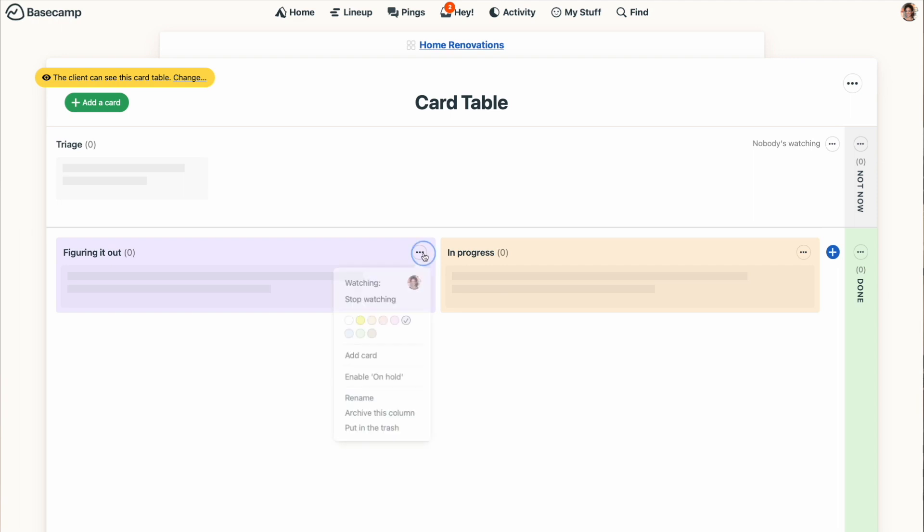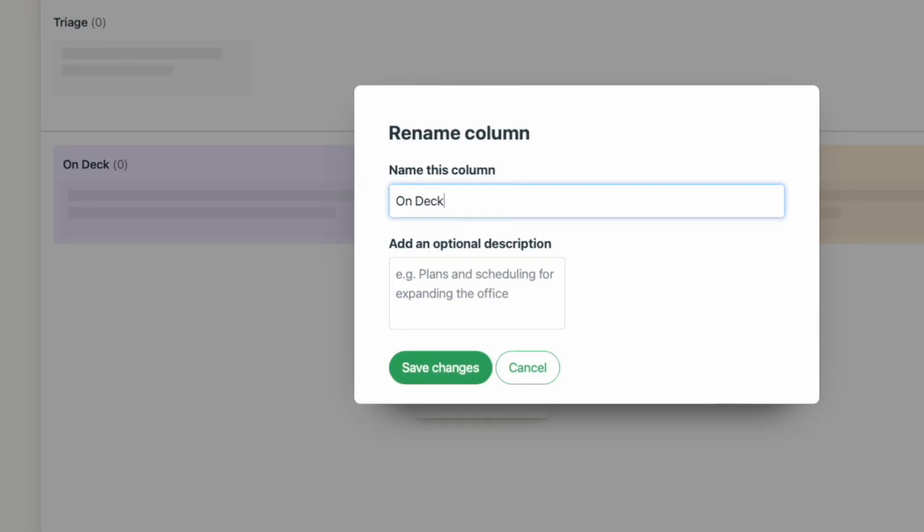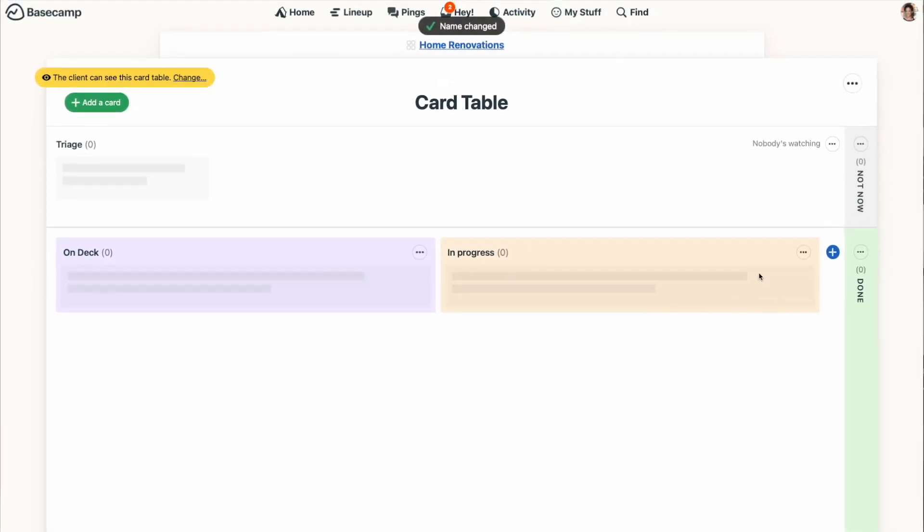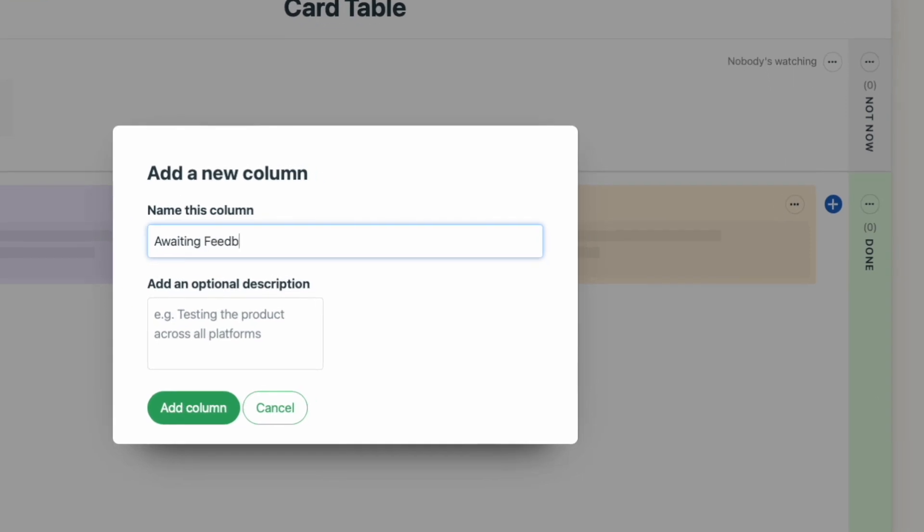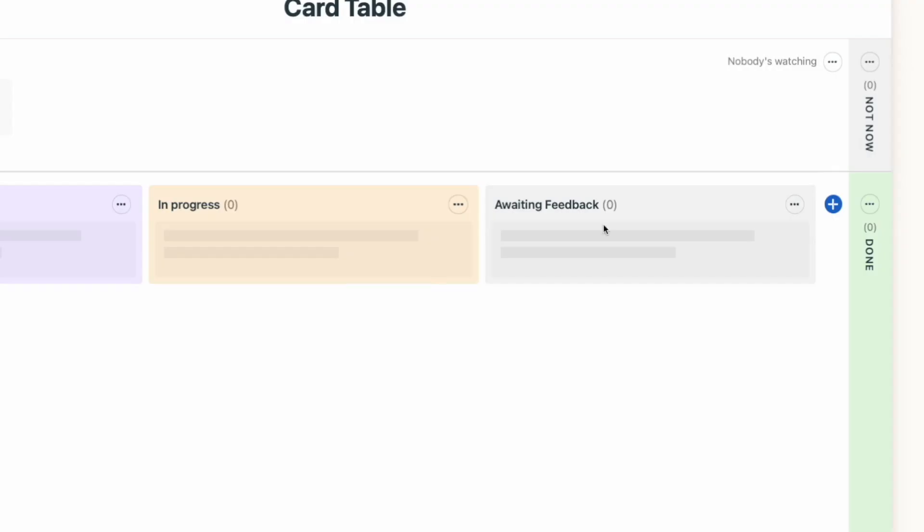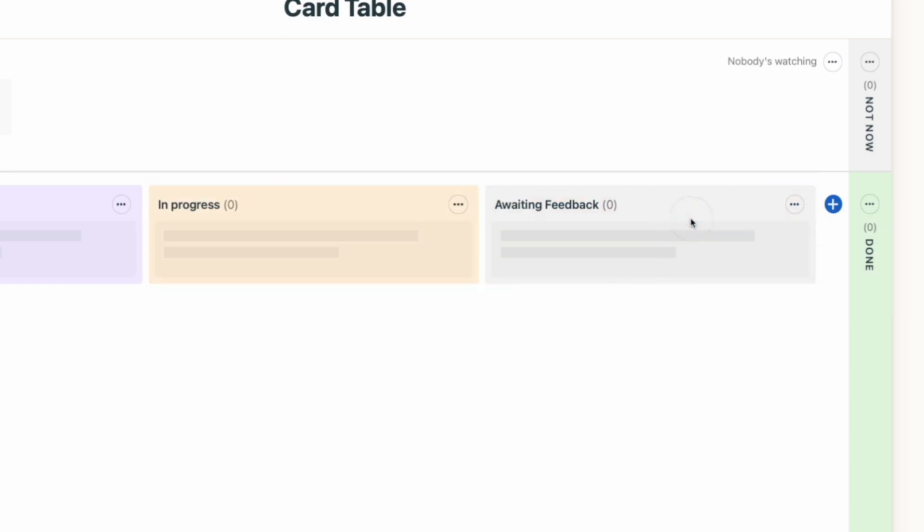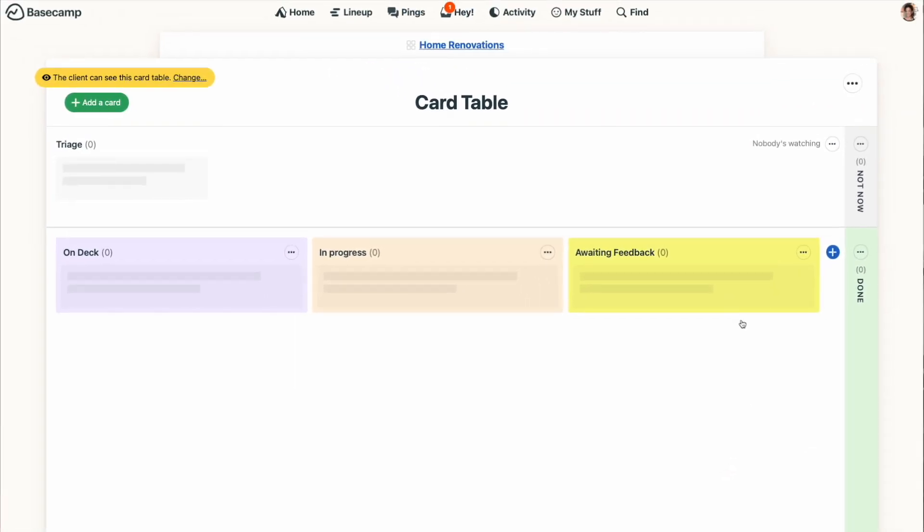Now, if those labels don't fit your needs, you can rename the first two columns using the three dots at the top right. You can also add additional columns with the plus button. Reordering columns is easy too. Just drag and drop them into new positions, and if you want to add some color, you'll do that with the same three dots at the top of the column.